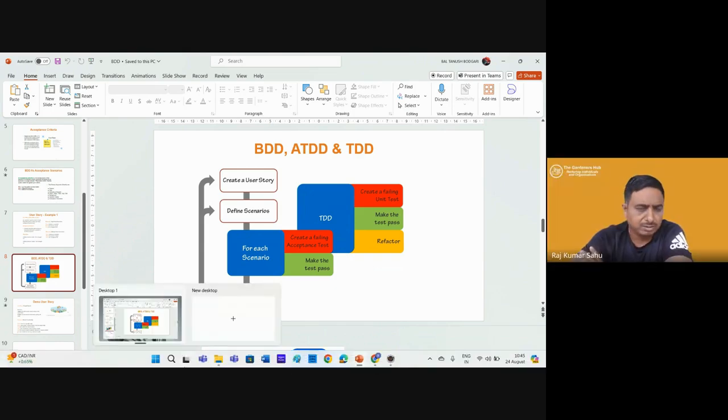One thing to add here, Bhanu and Sastik, from my experience, and what Bhanu said is absolutely right. These refinement meetings are essential where we can bring in the stakeholders. But the key is preparation for this refinement meeting. What I've seen is that people start writing the scenarios in that meeting, and then people say it is a waste of time for those attending. The best practice I have seen is that they create that information to 60 to 70% before that meeting.